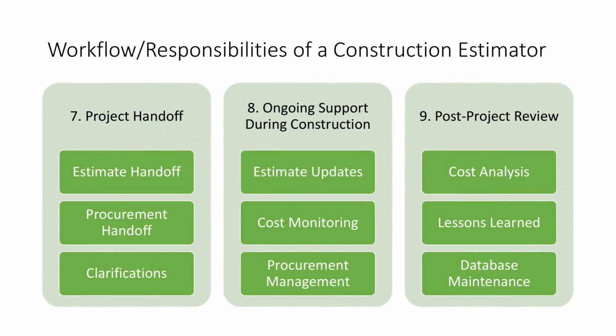And then you organize for procurements, you hand off the estimate to the project manager. And at that point, most of the work is done for the estimator. Then it's the responsibility of the project manager and the controller to take on the costs and manage the project. And finally, once the project is over, the project manager and the controller report to the estimator. They give back the numbers as a sort of feedback so that the estimator knows what the actual costs were. So next time they start the same or a similar project, they have the real, most updated numbers.